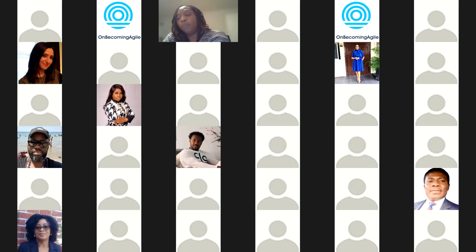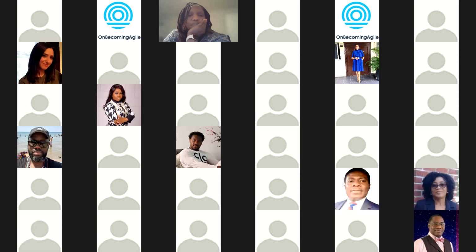So like they do, we have a release wiki that I put together prior to the release. So all the code that is going to be released is going to be in that wiki. Everyone who needs to be there, their names are already in that wiki. And then I post it on the release channel just a few days before. I ping the people that need to make sure that my code is in pre-production, just to make sure, oh, has the code been moved? They'll reply on the wiki. So they have a conversation on that channel back and forth before the release. That's all I do.